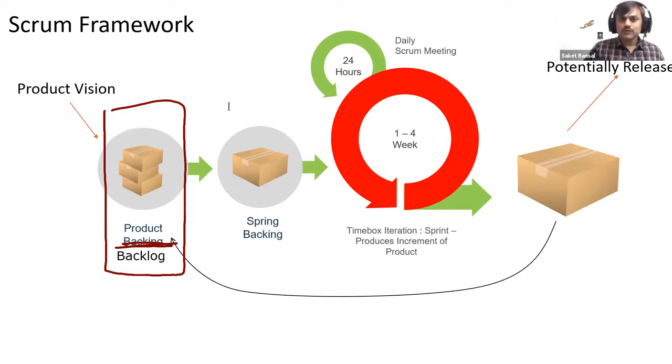Traditionally, what we used to do is we have a set of requirements and we tell how much time and money they will take to finish. That's what we do in project management. In a Scrum way of working, we are doing the reverse. We say, you might keep dreaming about a lot of ideas, but tell me what you want me to finish in the next 2-3 weeks.